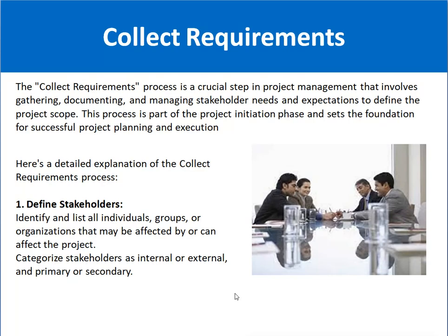So in that process of scope, we have a very important process called collect requirement. It means that you sit with the customer, try to understand his objective, what he wants to achieve from the project, his expectations, and what actually he wants to achieve. And once you understand, you will document all the things, properly communicate it to the stakeholders, and get the sign off from the customer as well.